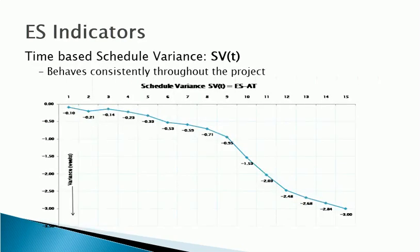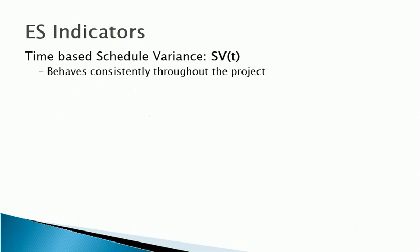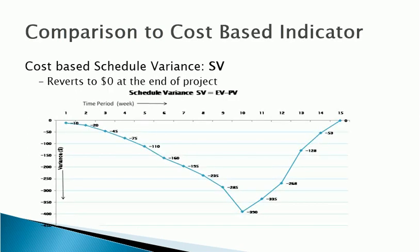Time-based schedule indicators can be computed from Earned Schedule data. These indicators behave appropriately and consistently for all phases of a project, as compared to their cost-based counterparts. As shown here, time-based schedule variance SVT ranges from negative 0.1 week at start to negative 3 weeks at the end of project, indicating the project finished late by 3 weeks. On the other hand, the cost-based schedule variance SV improves to $0 over the last third of the project after being negative for the first two-thirds — which is counterintuitive for a project finishing late.